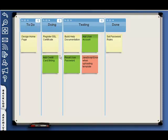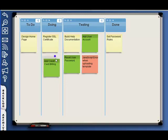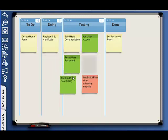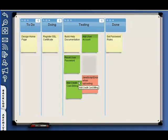This means that no more than four tasks may be placed into a lane at any time. Notice that if we try to put another task into our tester's lane, which is already full with four cards,